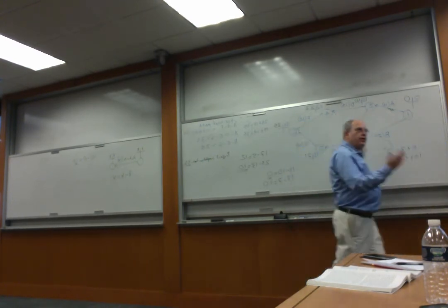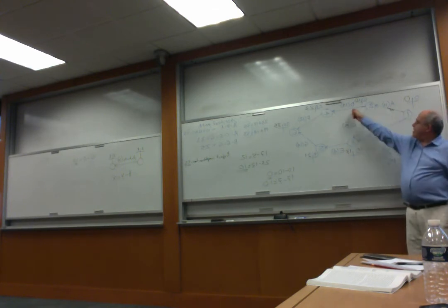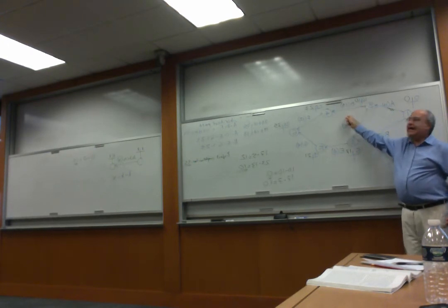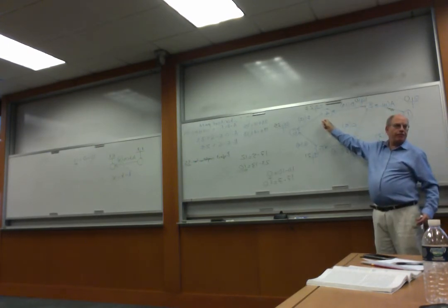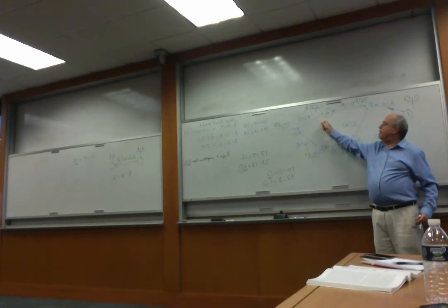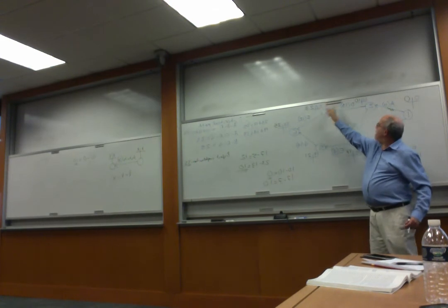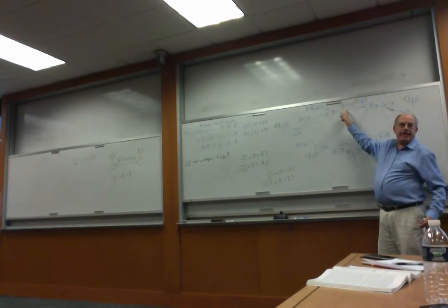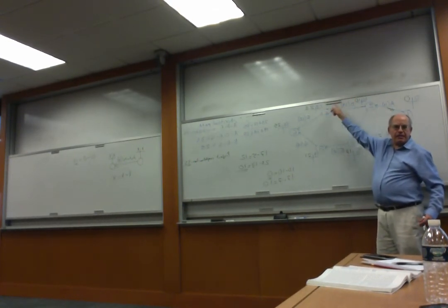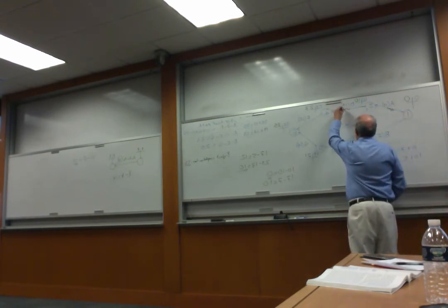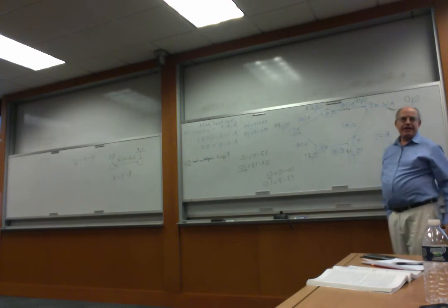Again, this is an opportunity for you to practice the conditions. D starts at 2. Starting point is 2. Do we have equal numbers? Yes, 10 and 10. D ends at 4, so the ending point is 4. Do we have equal numbers at 4? Yes, 23, 23. Last condition, is the difference 23 minus 4 equal to the length of D? Yes. 23 minus 4 is 13, which matches the length of D. So check mark. D is on the critical path.